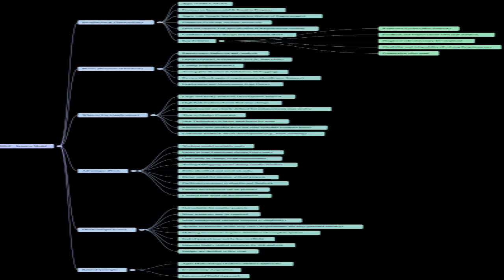Right. And the research we looked at really emphasized how continuous this feels. Because the cycles are relatively short and focused, you often find multiple iterations actually happening at the same time, don't you? Like one team might be coding iteration 3 while another is already designing iteration 4. Precisely. Yeah, that happens a lot. This structure, sometimes people call it evolutionary acquisition, because the product is constantly evolving towards its final goal, right? And the acquisition of new features or requirements happens incrementally over time, not all jammed into the initial contract or plan.